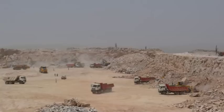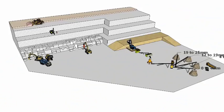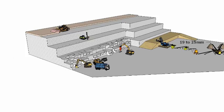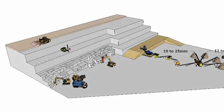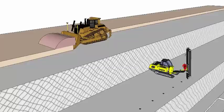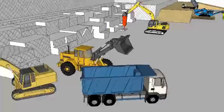Quarries and Aggregates Production. Rock is extracted by drilling and blasting. Blasting is used to loosen and fragment the rock so it can be loaded into tipper trucks which transport it and tip it into the primary crusher at the crushing and screening yard. Using a series of crushers and screens connected by conveyor belts, different size ranges of aggregates are produced and then transported to the asphalt and concrete batching yards on site.